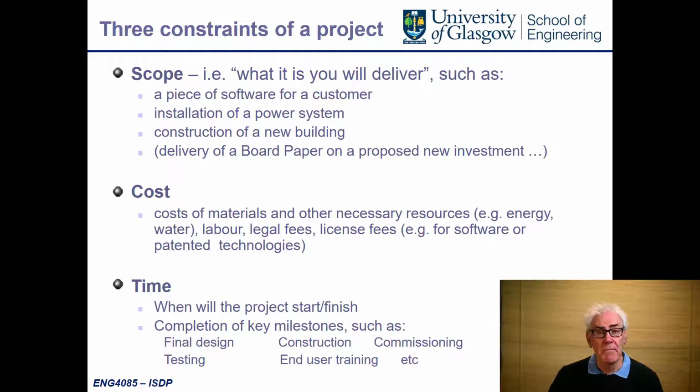And finally, the time is fairly obvious. It's when the project will start and when the project will finish. And also, it will be governed by the passage of key milestones. These may be initial design, final design, construction of the project, commissioning, testing, and finally, end user training, because a project is not complete until the end user has accepted the project and delivery.